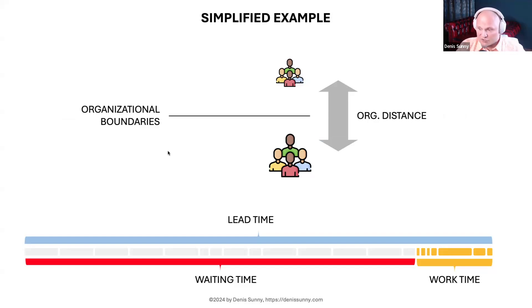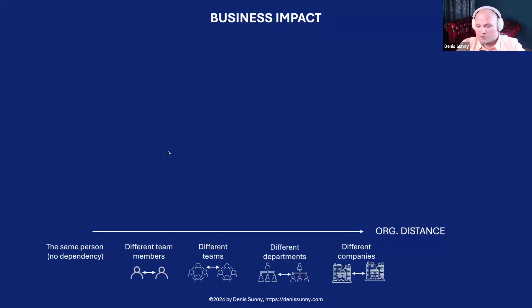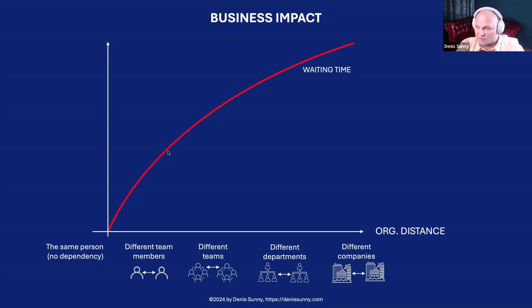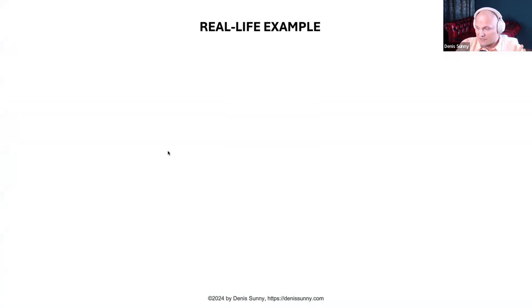If we group all work and waiting time elements, we discover that actual work time is a small fraction while waiting time is huge. When parties belong to different organizational elements — different roles, teams, or departments — there is an organizational distance between them. With increasing organizational distance, waiting time dramatically rises, and speed of value delivery drops.